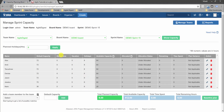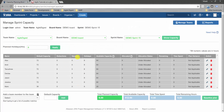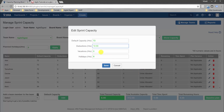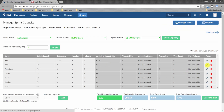Now we'll address vacation deductions. Everyone has a deduction of 12.33 hours for ceremony time, and individuals have different planned vacation hours. We click on each team member, enter deduction of 12.33 hours and the vacation hours — for example, 8 hours — and click Save. We'll update the entire team this way.